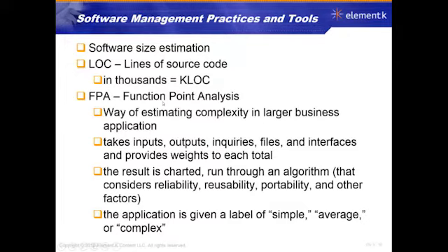There is something called function point analysis, and this is really for larger businesses and really large software projects. There's an algorithm, and we basically say, okay, what are the inputs of this software? What are the outputs? What are the interfaces? What are all the files involved? What are all the features of this thing? And they run it through an algorithm of, okay, is this thing reusable? Is it portable across different platforms? How reliable, how stable is it? And then it comes out with sort of an assessment of this thing will be simple or average or complex. So you might, in a larger environment, see function point analysis.